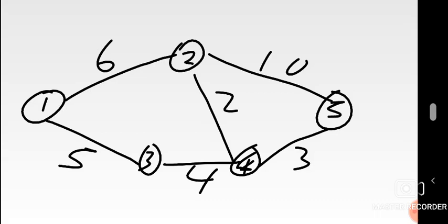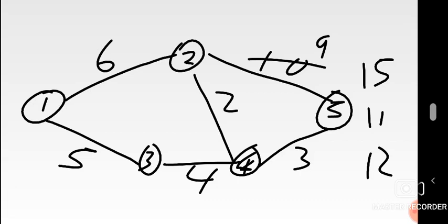So you start. Okay, minus 1 gives you what? 9. Determine the critical path. Whenever you crash, determine the critical path. It's a process. 1 to 2, 2 to 5, giving you what? 15. 1 to 2, 2 to 4, 4 to 5 gives you what? That's 11. 1 to 3, 3 to 4, 4 to 5 gives you 12. Okay, you have your figures. The longest route apparently is the same one. You only crash where? Critical path. That's all. Those are the routes.